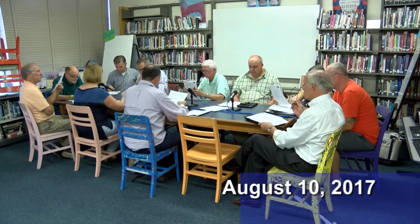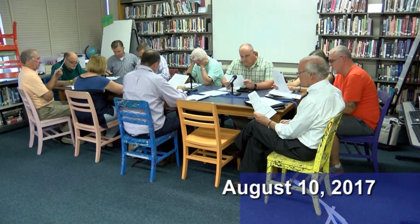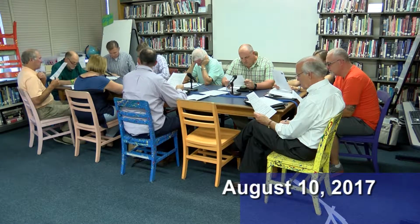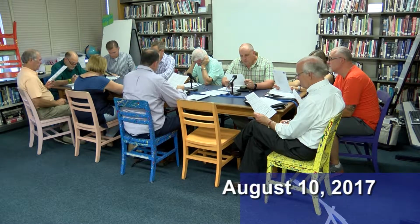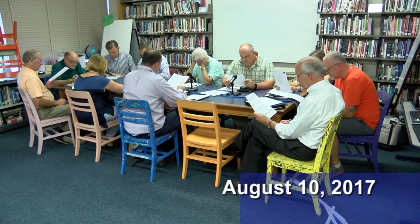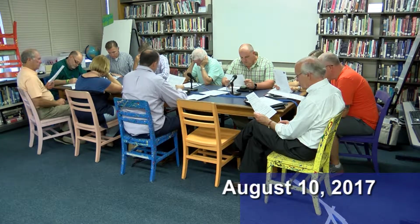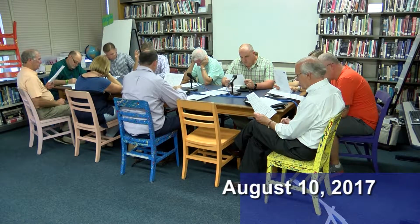So the next sheet I have is the financial status on where we are. And so again, column A is our budget for the PFA, the project funding agreement with the MSBA. So that was $34,208,000 and change. So far, invoice to date has been $8 million. So there's still a long way to go, but we're about 25%, give or take. What we have contracted to date is only 27.9 of that 34.